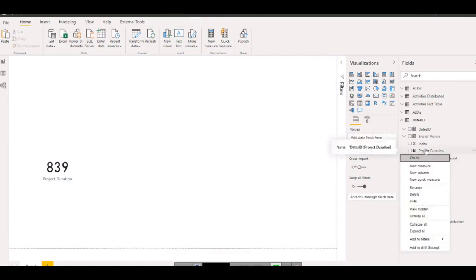If your case is different, for example, your baseline dates are already gone and you are following the forecasted date. For example, your baseline date was 1st January to be finished and you are here at, let's say, the end of January, and your EOT is not approved and all these things going on. So definitely if your baseline date is already in the past, you need to use the current dates, or maybe you need to revise the baseline. So it's up to you.